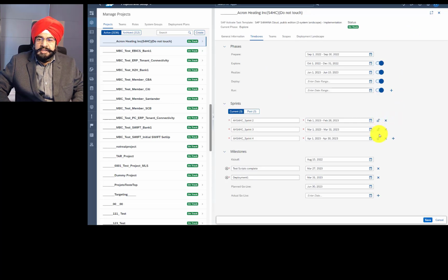You can lock a sprint, and we will use the term lock and close interchangeably. What does locking or closing a sprint mean? All it means is it's not open for new work. An example could be you may have some organizational rules that the sprint scope is frozen on, let's say, Thursday because the sprint has to start on Monday and the team needs some time to prepare. So you can plan a sprint and on Thursday, click on this lock icon. This means the existing scope that has gone into a sprint is preserved. New scope cannot go in.